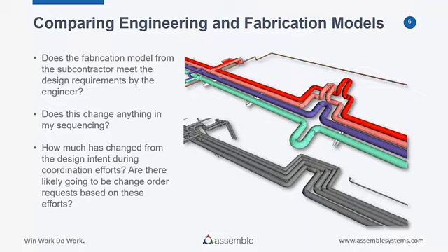If you've initially put in a sequence of maybe the HVAC ductwork going in first and then the plumbing going in second, did you, during that coordination effort, switch those two so now you have to reverse the sequence on those? All of those things can impact the schedule of the project.